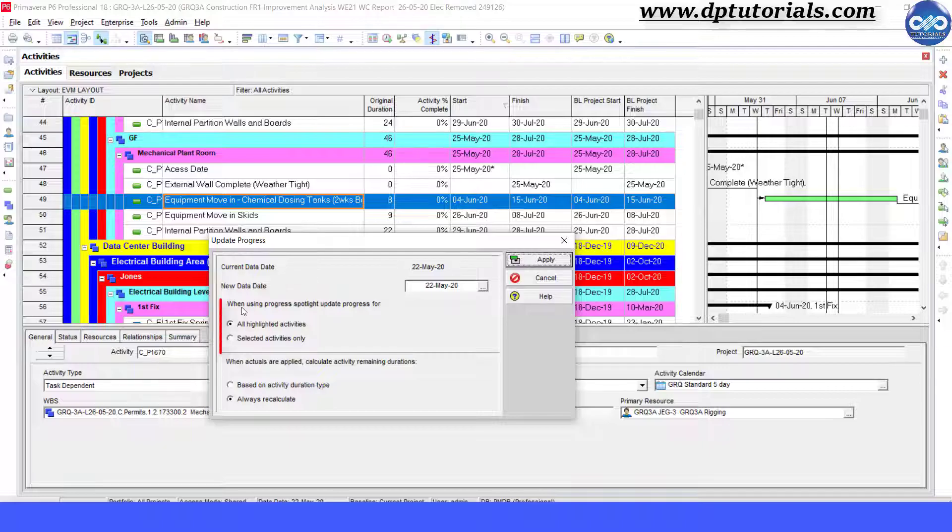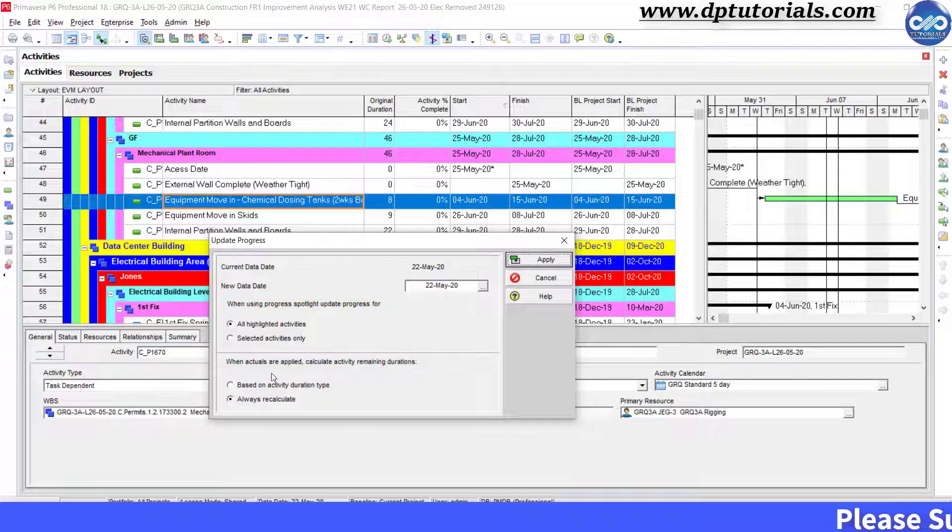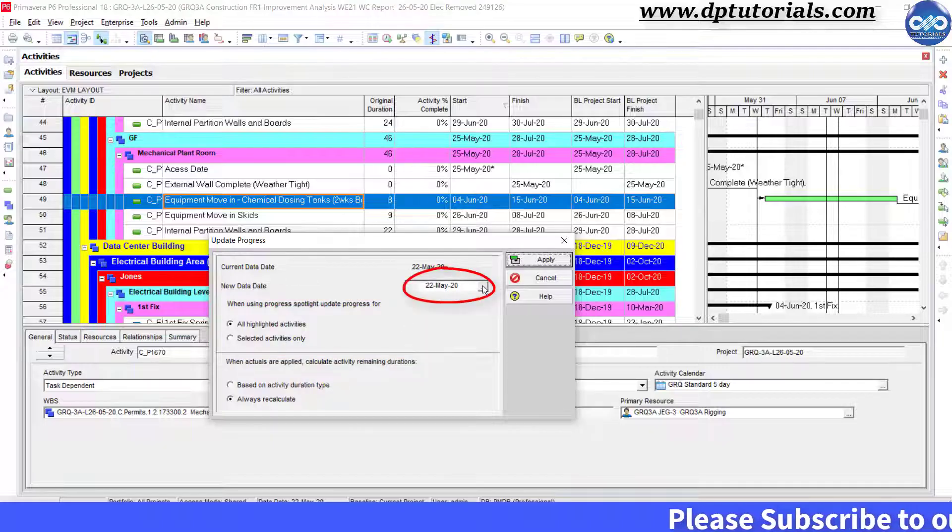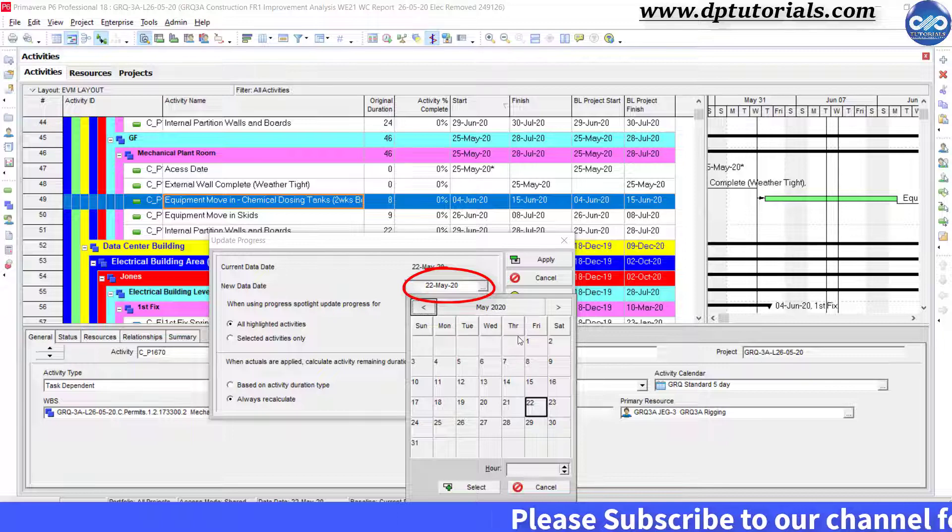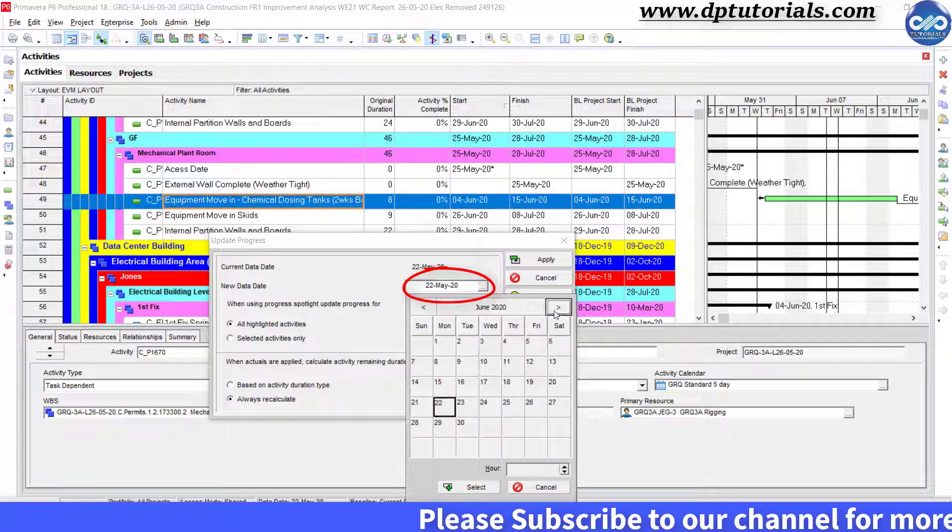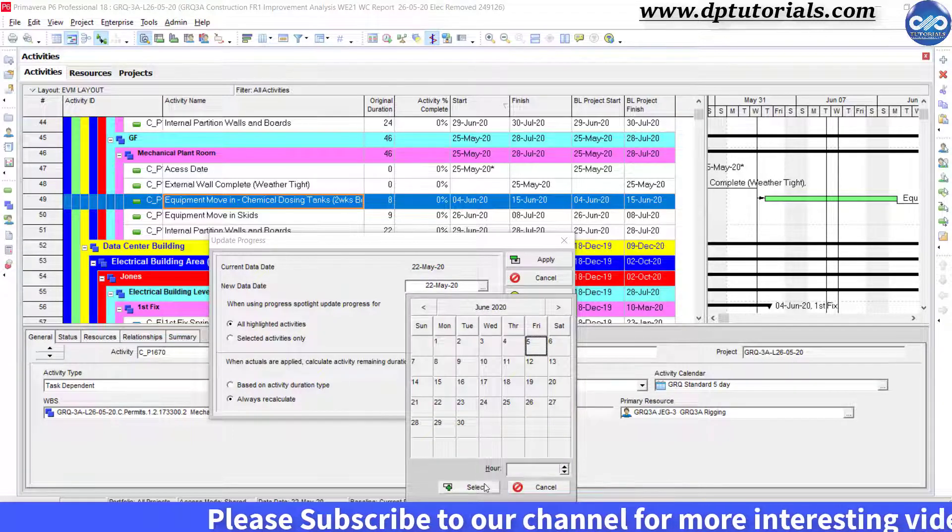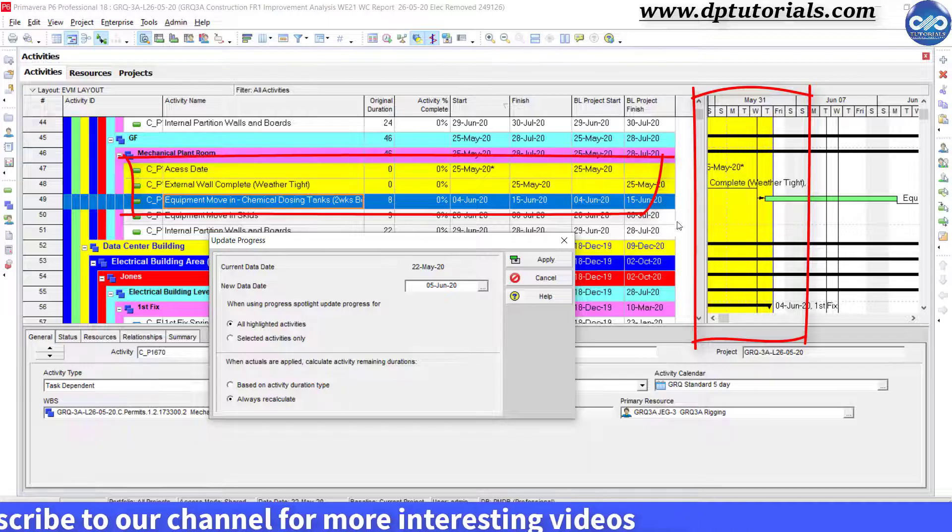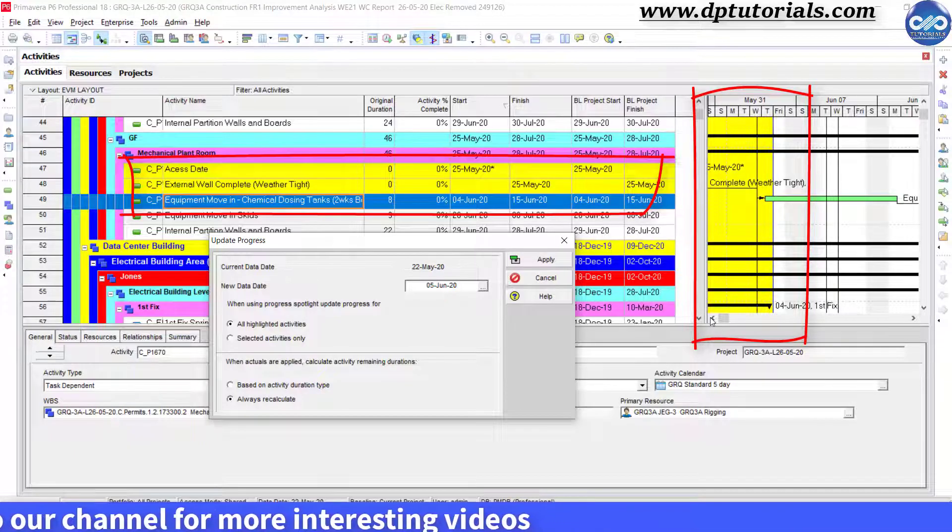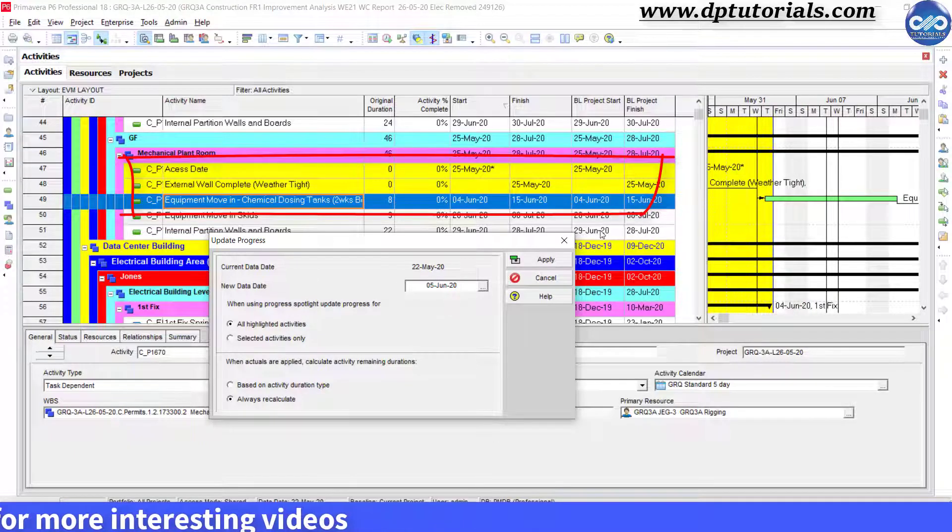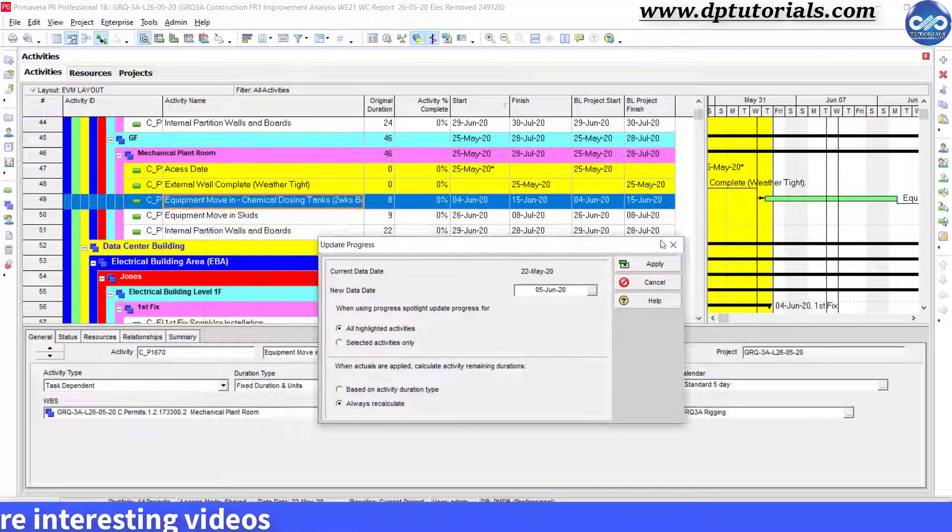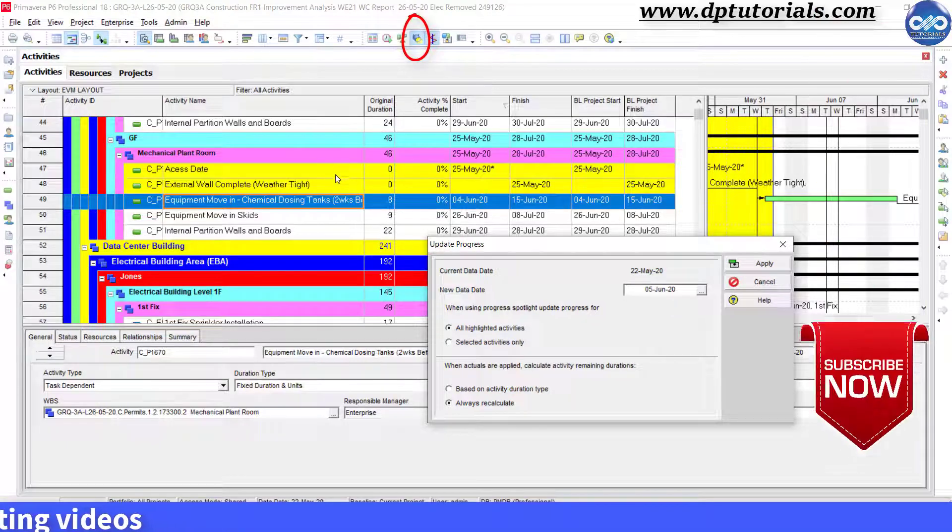It is asking whether all the highlighted activities are to be updated or selected activities only. You can change the data date here, for example, put it as 5th June 2020. Then it will automatically highlight all those activities falling before 5th June, which is nothing but the spotlight feature.